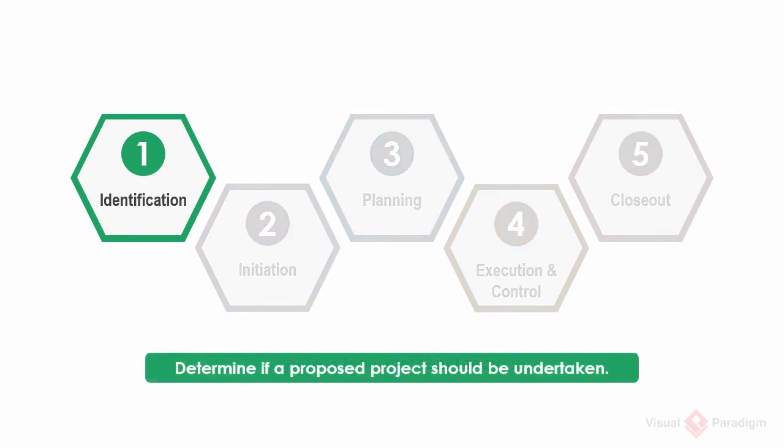The first phase is the identification phase. Its primary objective is to determine whether a proposed IT project should be undertaken. Activities of this phase involve identifying solutions and providing recommendations based on the analysis of cost and benefits for each possible solution. By the end of this phase, a project proposal will be developed. A project sponsor evaluates it and determines if the project should be undertaken. Projects receiving formal sponsorship progress to the next phase of the lifecycle.